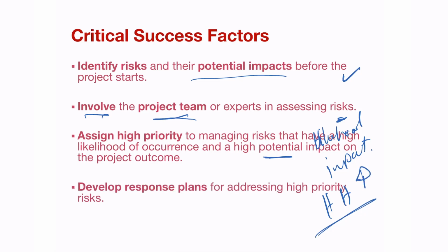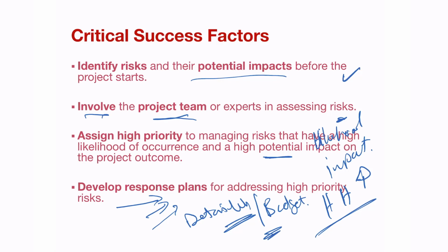Develop response plans for addressing high priority risk. There needs to be a detailed response plan with a person responsible, with a budget allocated to it, in order to ensure that in the likelihood that that particular risk event occurs, there is a response and a very quick